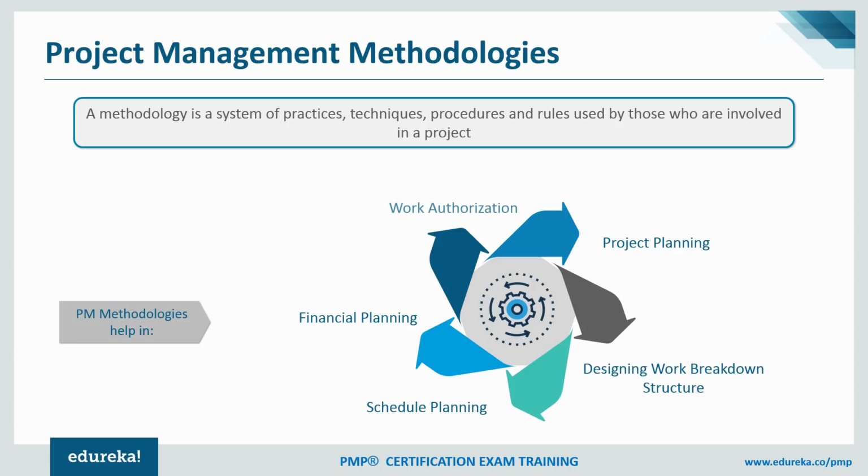Schedule planning is another important activity that we do. Methodologies actually help us in approaching the schedule planning activities properly. If there is no methodology, it will be very difficult for us to sequence the activities properly, create the network diagram, calculate the total duration that is required, and determine the schedule of the project. All these things would be possible only when we apply the project management methodologies.